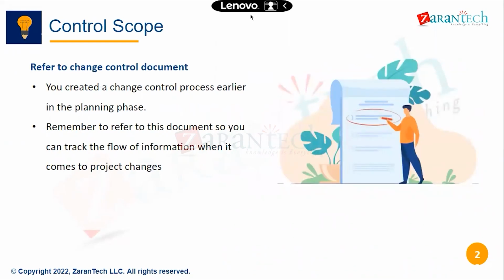And there will be change control documents. I will share some of the change control documents you can go through, like the change control policy or acceptance of the change. These are change control board templates. Before implementing the change, you have to document it: the effect of this change in terms of business, the effect on other requirements, and the time and cost required for this change. You put all that in a document and get it approved. Those are part of the change control board templates. I will share some of these documents you can go through.